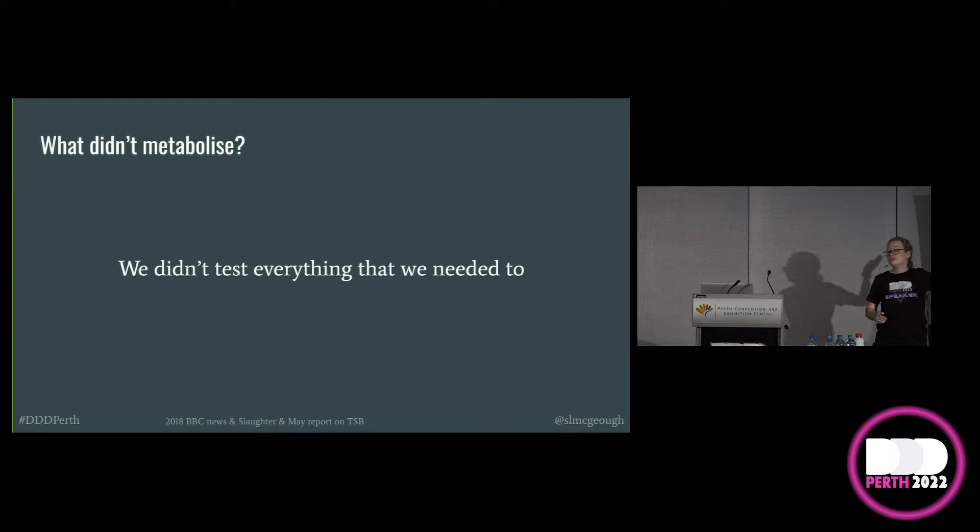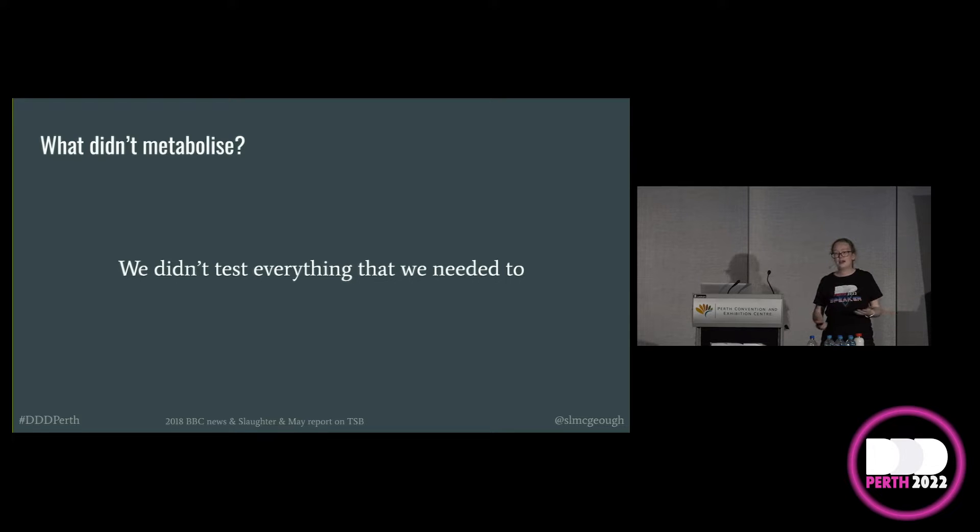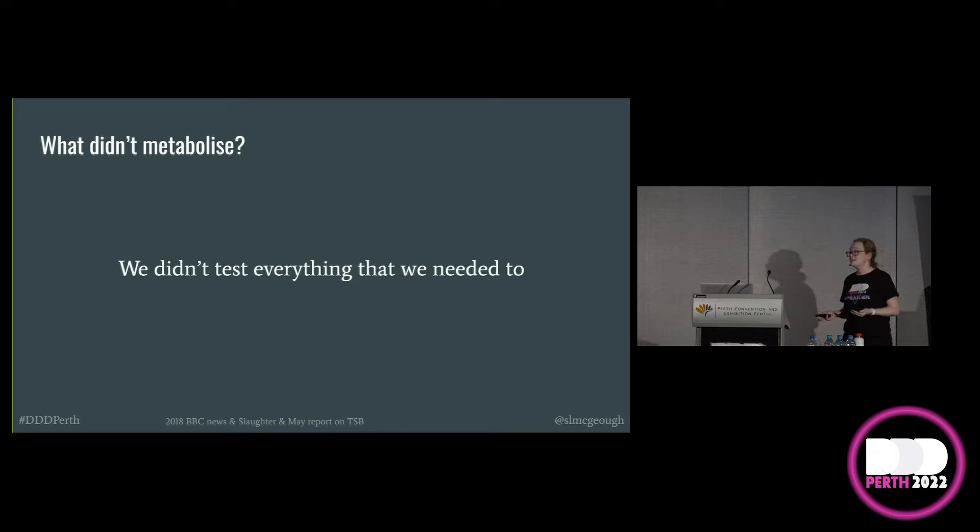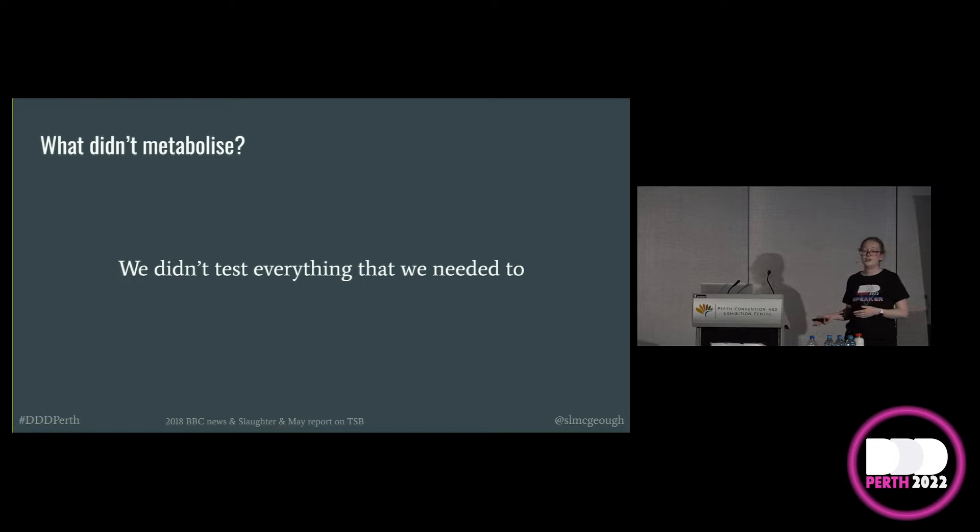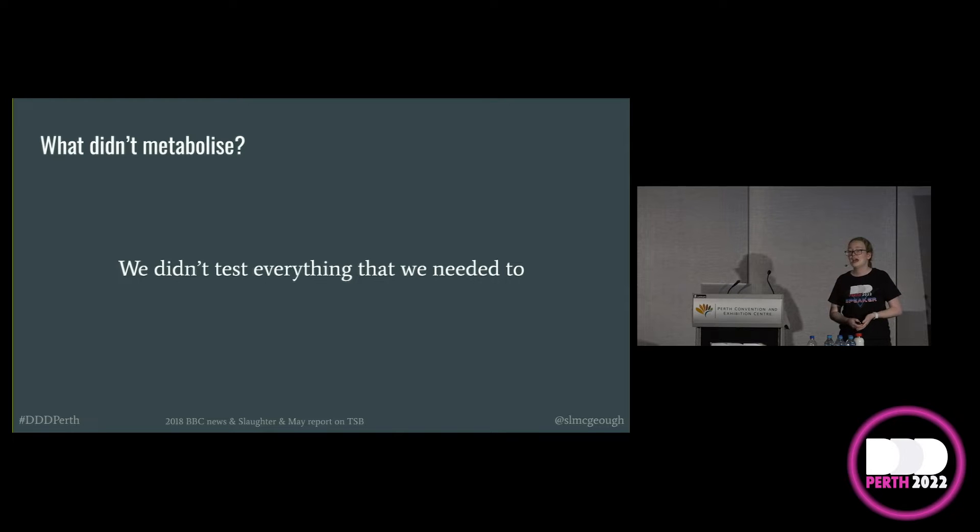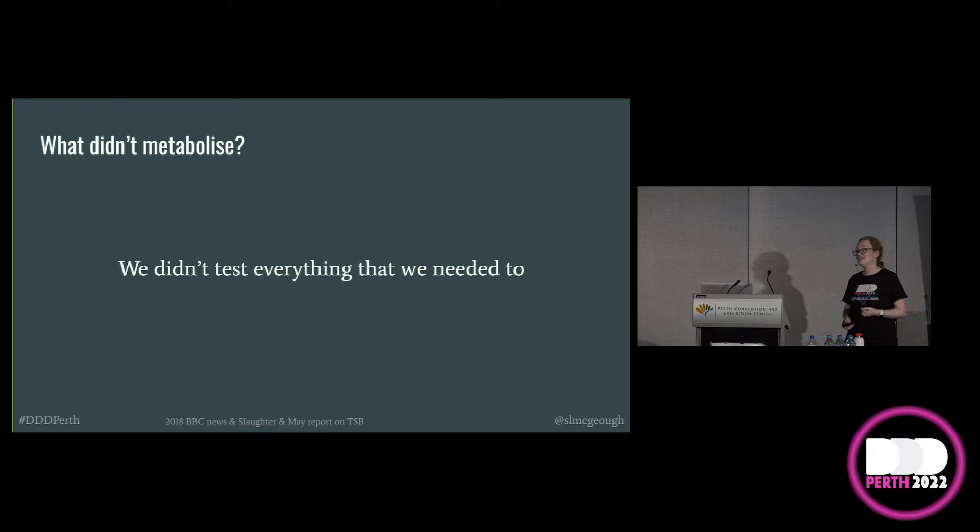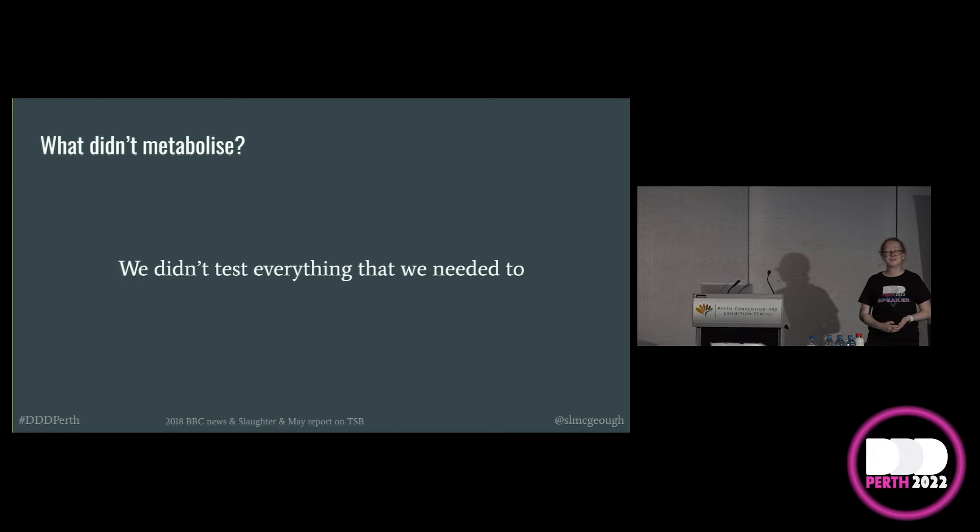And we didn't test the entire process end-to-end. What happens between every single one of those 135 pathways in the liver? So we didn't even have anything to compare the results that we did generate to. And we only tested and planned for the happy path. So what happens according to plan? How the liver is meant to metabolize things? And given that in this scenario, we were deliberately trying to stress it to break down the metabolic processes, we really should have considered that unhappy path. We just simply didn't test everything that we needed to. And look, that isn't something that's just restricted to medical research. Inadequate testing also contributed to the failure of TSB Bank's software migration in 2018. And that cost them £330 million and lost them 80,000 customers. So that's a pretty big mistake for not testing something.